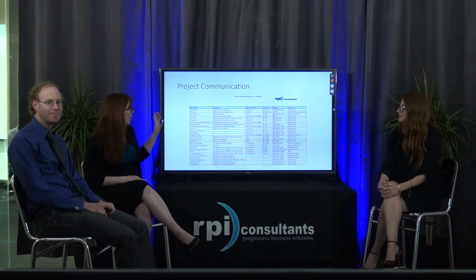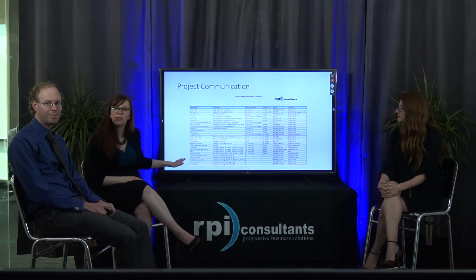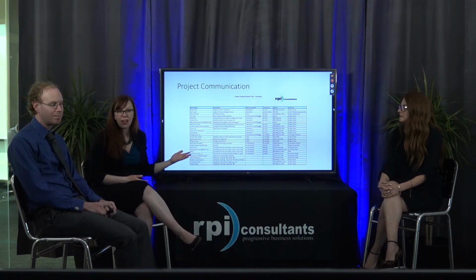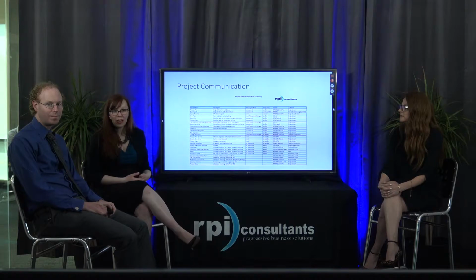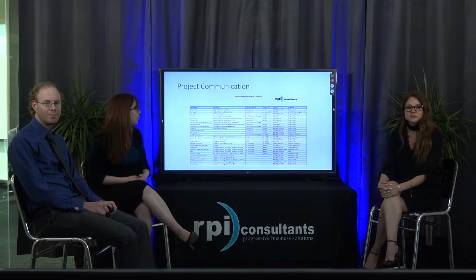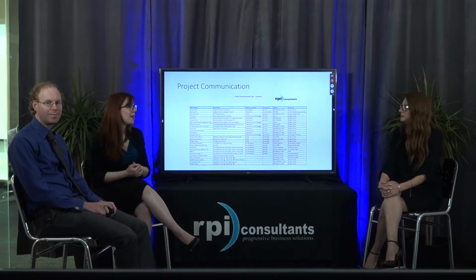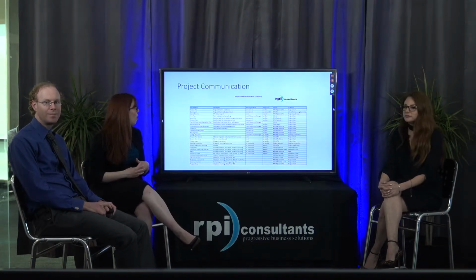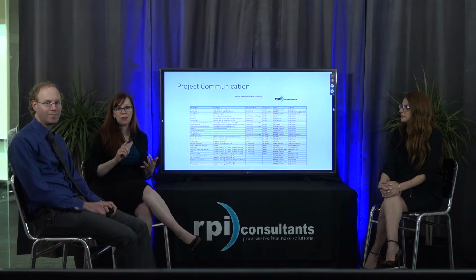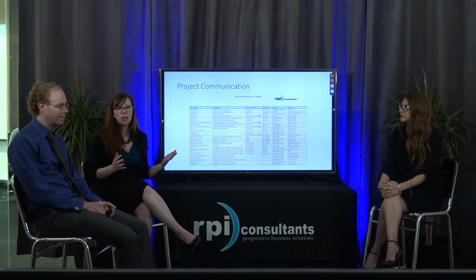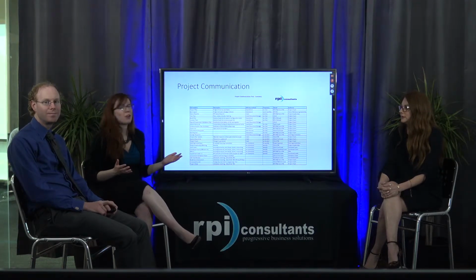You'll see we have a number of deliverables. Some of them are as simple as an email or a report that comes out periodically. Others are meetings with different groups. And we like to do this right up front in the very early stages of the project and get the whole team to agree on who needs to be communicated with, what they need, what our frequency is, and what our best delivery method is.